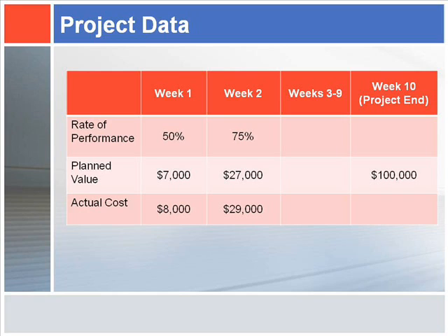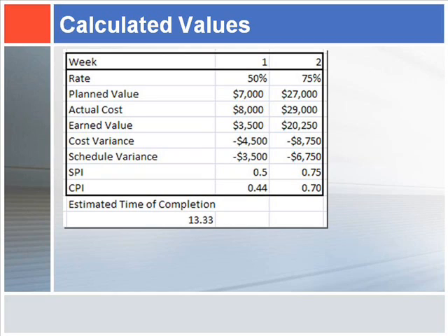Although, taking note of the planned value and the actual cost, we can easily identify the actual amount of this project will be more expensive than the planned value. Therefore, we must use the previous set calculations to project out and retrieve additional information to understand whether this difference is true. In this slide, we have calculated the earned value, cost variance, schedule variance, schedule performance index, and the cost performance index as seen here.